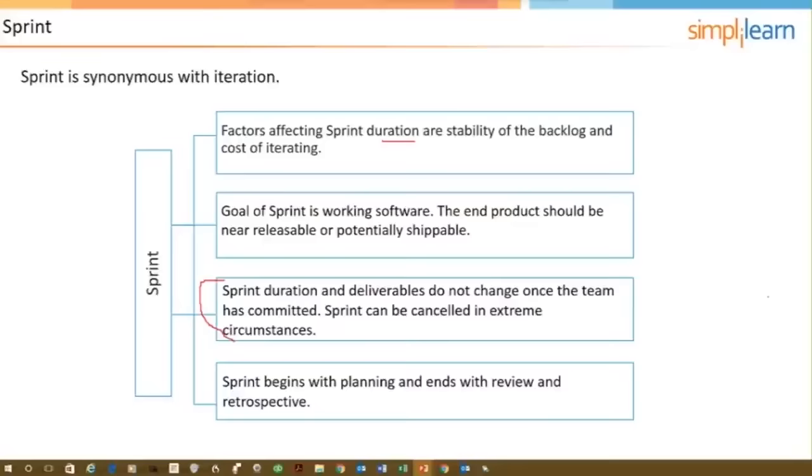In the planning meeting, the product owner has to be there, and the product owner is the main driver of that meeting. The product owner is talking about or dealing with the priority of the user stories. The team's weighing in. Maybe there are some dependencies that need to be considered, but the product owner has to make the hard decisions with regards to what's going to be done in the next sprint based on the constraints from the team, like velocity and technology and sequencing and things like that. So I kind of answered that from a real-world point of view. Yes, it could be. It's not desirable. On the test, they are completely separate.